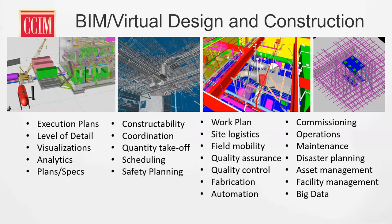Once the building is built, going through the commissioning process and turning it over to the owner — giving the owner this information so they can use it in their operations, maintenance, disaster planning, asset management, and facility management — gives them more power because they know everything about the building. Think of it like a VIN number for a car: you can pull up the VIN number and find the exact light bulb you need for your right rear tail light. That's what we're getting to with buildings — knowing every piece and part that goes into that building, who worked on it, and when it was installed.